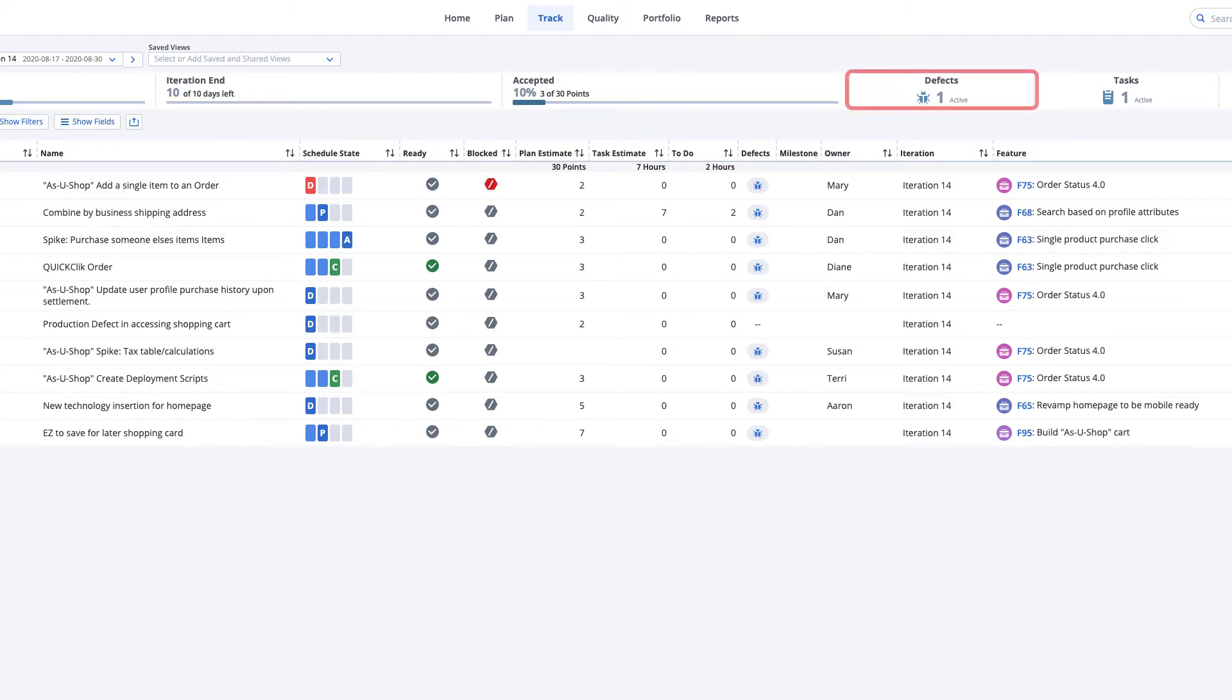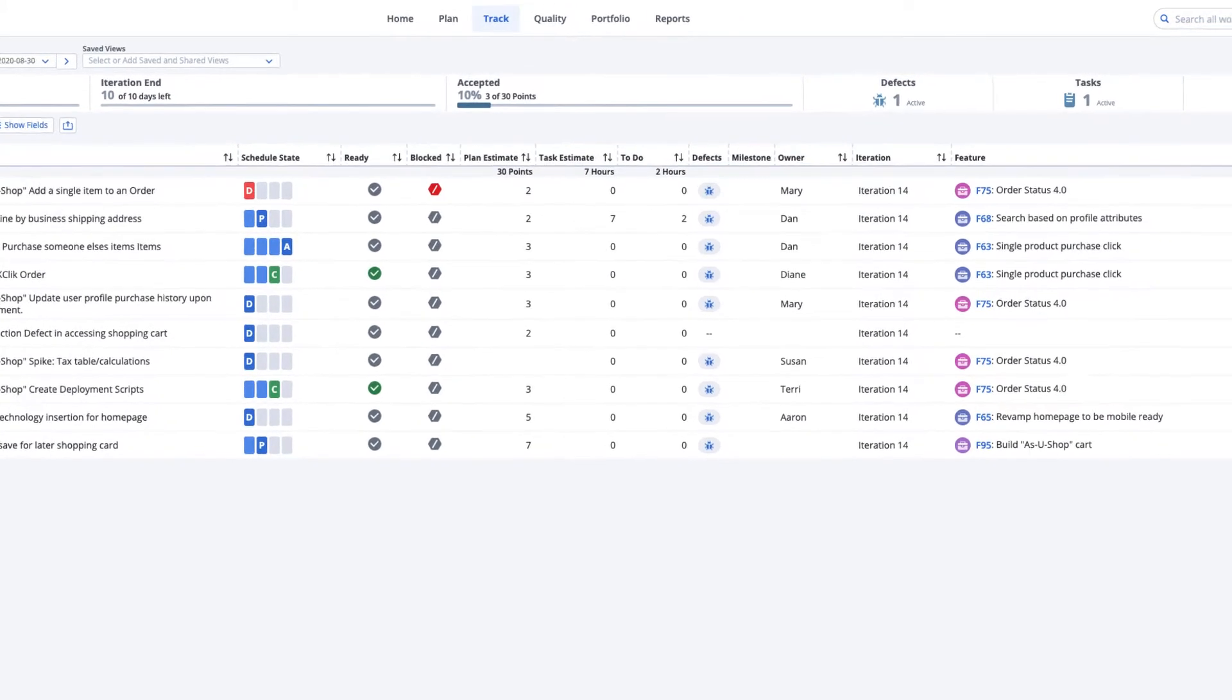Scrum Masters can mention the count of associated defects at each daily stand-up meeting, which should be driven down to zero by the end of the iteration.